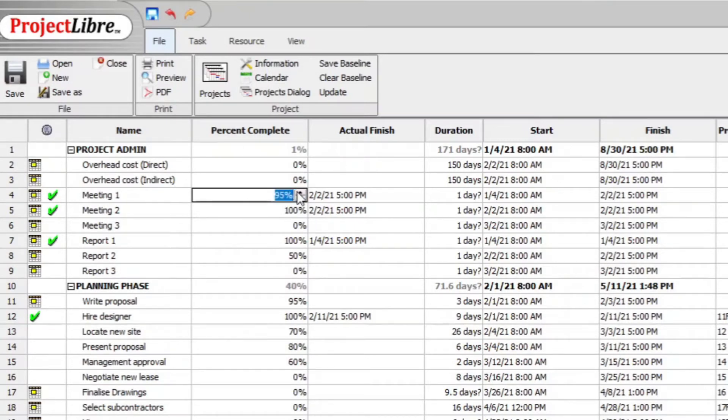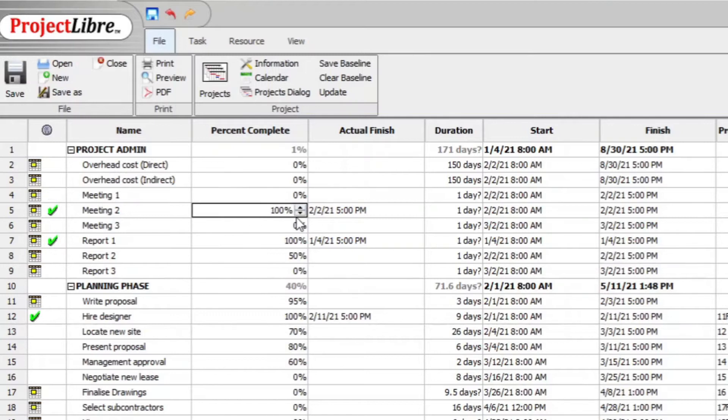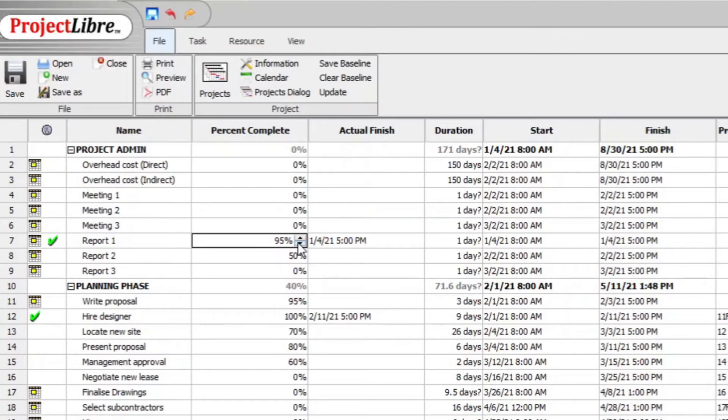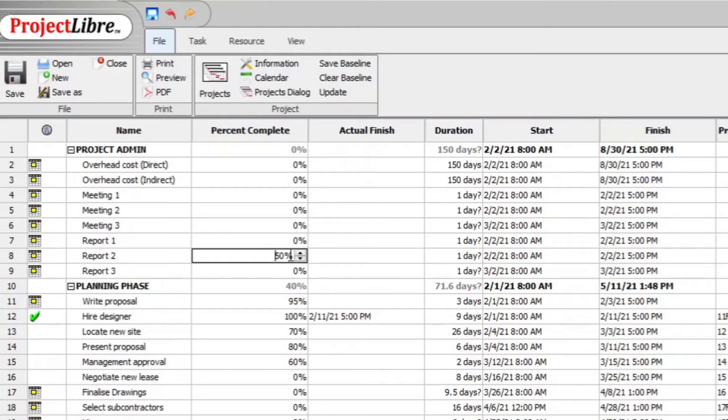Date completion, percentage completion, you reset now to zero. You will see the date disappears. Be sure you can then later on at a later stage also correctly insert because now you have a copy of the completion dates.